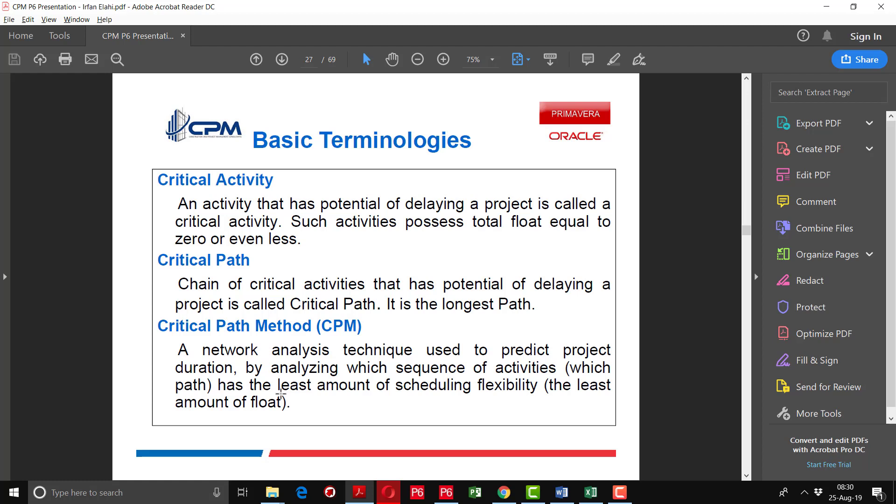The critical path method calculates the theoretical early start, early finish, late start, and late finish of all activities present in the schedule by using the forward pass and the backward pass.